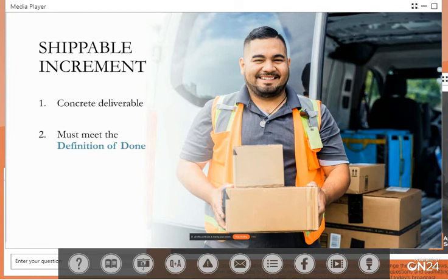And that feature is swappable door panels. So as we think about this, an increment is the completion of that feature. We'll keep going through the continuous cycle, but this is the shippable increment with that concrete deliverable feature X. Now, you can actually have multiple shippable increments in a single sprint.